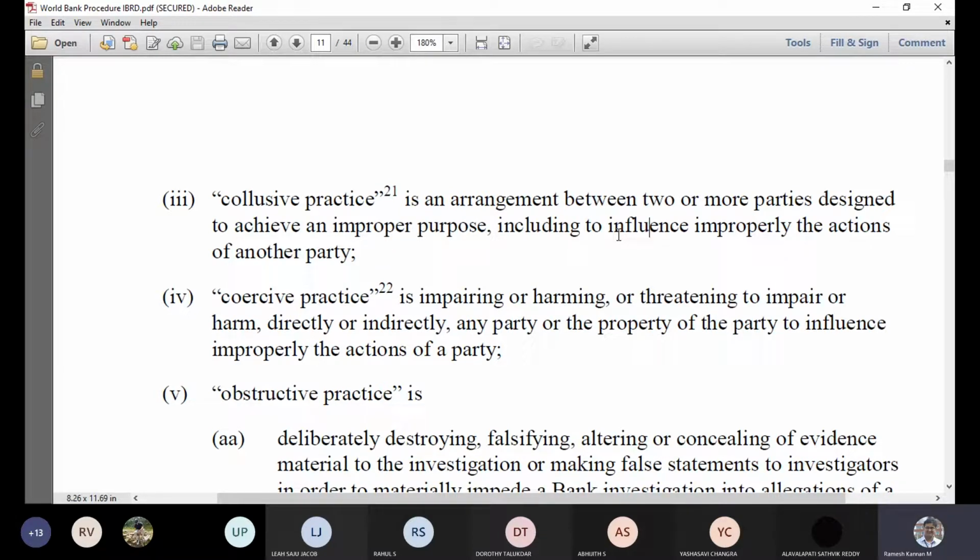The subordinates will quote a higher price, so that the prime company can quote less than the higher ones, not as low as possible. But then in the overall perspective, the low bid wins. So it's a kind of cartel or collusive practice. It should not happen, and there should not be any bias in the bidding.